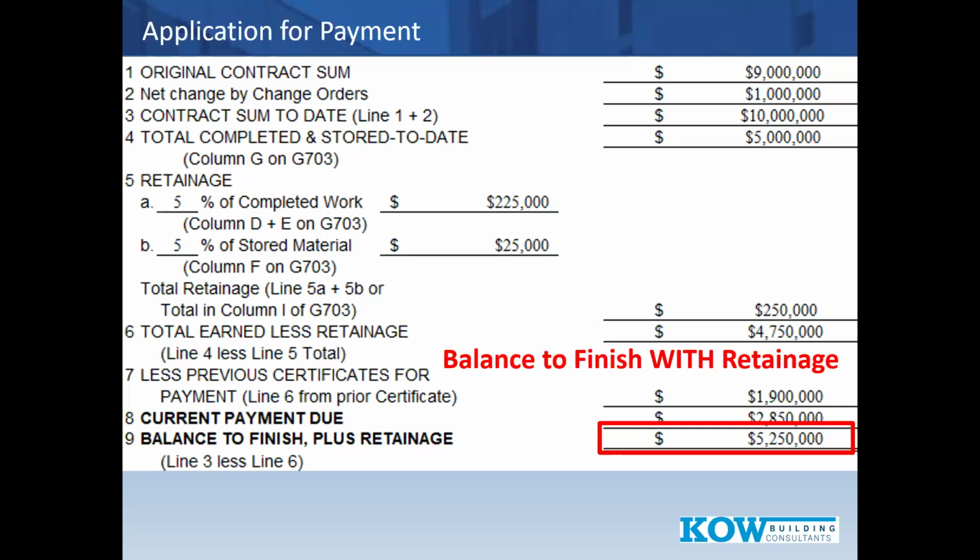Now, with that said, we see projects all the time where you'll have a concrete sub that will say, listen, I finished the foundation. I'm done. All my test reports are passed. I've pulled all our workers off the job. We're across town on another job. You can't hold retainage on me until you finish the building 18 months from now. They have a very good point.